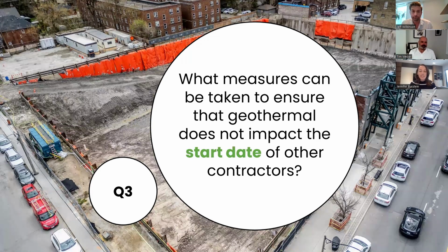Sure. It's all very site specific. The example you have on the screen right now is a bit of a larger site. Early stage coordination is important, of course, but you could look at this site and think, all right, the bore field can be drilled concurrently with the shoring contractor doing the perimeter shoring. We've had experience before where we've had to demolish buildings on quite a large site, and we were able to design the bore field around those buildings. So we were able to demolish, drill the bore field, and do the perimeter shoring at the same time.